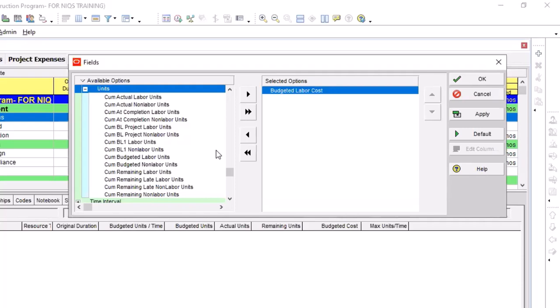You want to look at each month on its own merit, or each week or each day. We do most of our cost planning and tracking as cost control on a monthly basis. You can do it on a daily basis, but you don't need to stipulate that in Primavera. You can do that in any of your add-on softwares.